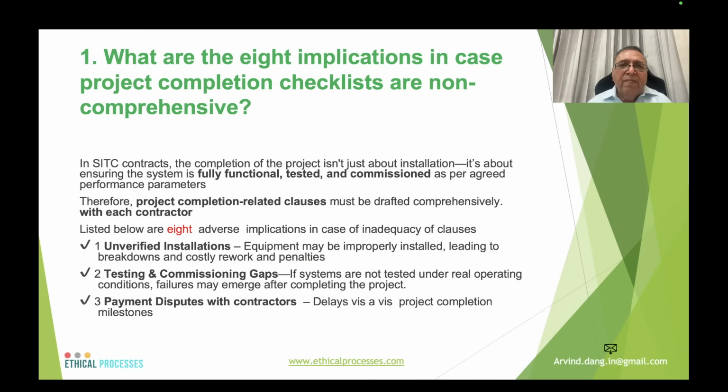1. What are the 8 implications in case project completion checklists are non-comprehensive? In SITC contracts, that is supply, installation, testing, commissioning contracts, the completion of the project isn't just about installation. It is about ensuring the system is fully functional, tested, and commissioned as per the agreed performance parameters. Therefore, the project completion related clauses must be drafted comprehensively with each contractor. Listed below are the 8 adverse implications in case of inadequacy of the clauses.